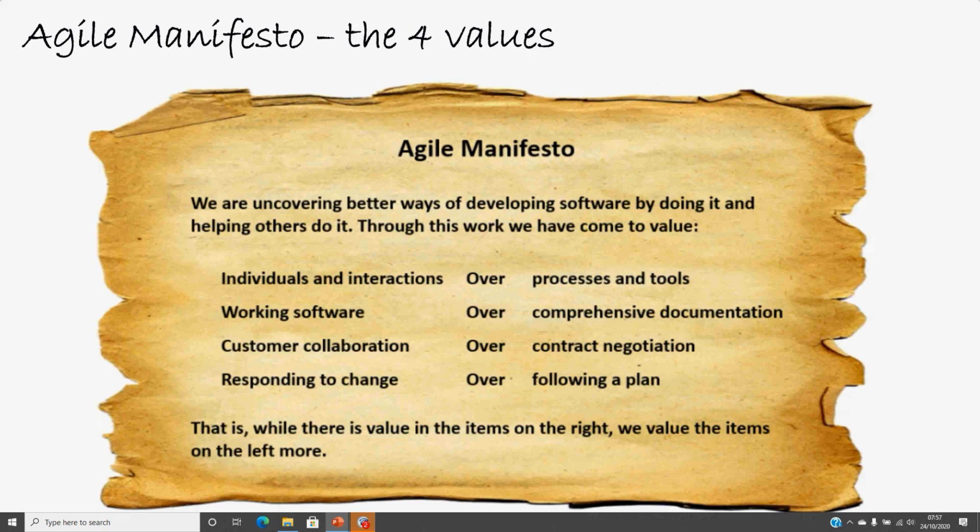these features and add those features, and at that stage in traditional delivery, we don't like that. We just say, look guys, we have captured our requirements, we have done the design, and now we are building it. It's very difficult to go back and change everything. So usually the chances of making those changes are very small, and it takes a lot of work to go back and do those changes. So that's why we become very change averse while we are following the traditional project implementation methodologies.